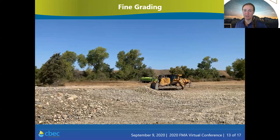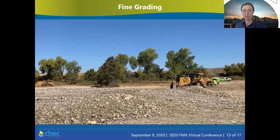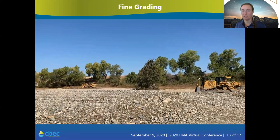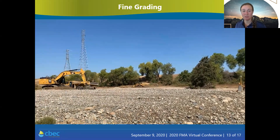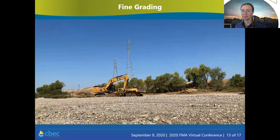In mid-July, Tykert Construction began fine grading the habitat channels. Here we see dozers, excavators, and haul trucks filling in the deep ponds that daylight subsurface flow at the midpoint of the site in summer conditions.